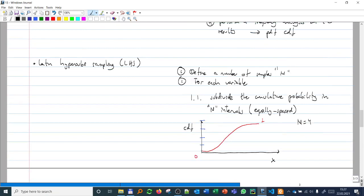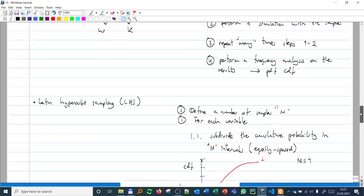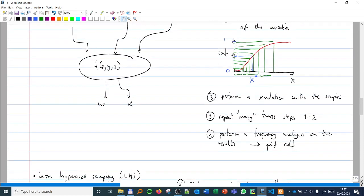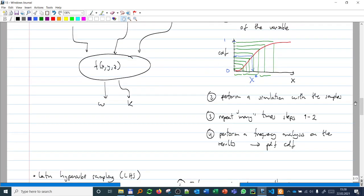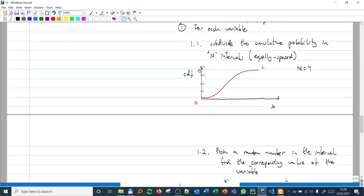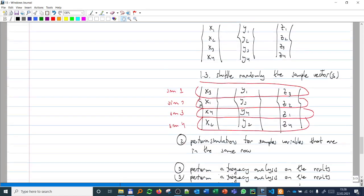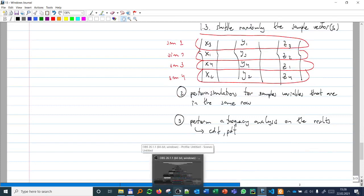One advantage Latin Hypercube Sampling has over Monte Carlo is that in Monte Carlo, because sampling is purely random, you could end up picking many values that are very close together. In LHS, by dividing into bins and taking only one sample per interval, you avoid sampling two values from the same interval. In theory this means fewer iterations are needed compared to Monte Carlo — it is a more organized way of taking samples. The next step will be to do an example.